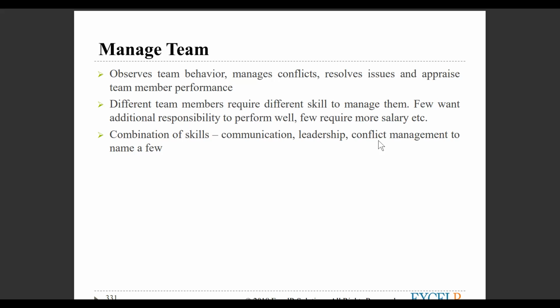So first and foremost thing is you define the role matrix, the responsibility matrix. Number two is when the conflict has already occurred, you call a one-on-one session. Have a joint session with the team lead as well as the other person. The three of us get involved in a war room, where you understand his concern and the other person's concern. Let them speak out about what the problem is.